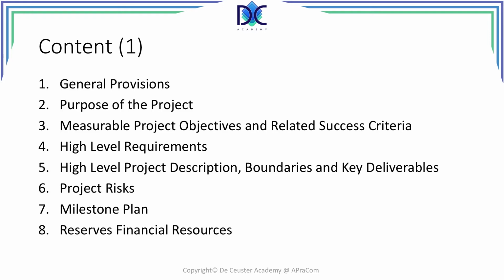We look at some reserved financial resources. It means that some money already has been or may have been reserved to complete the project. We don't know yet if this money is sufficient, but it's the starting point of the project. And later, when we finish the project plan, we will know that these resources are sufficient or not.